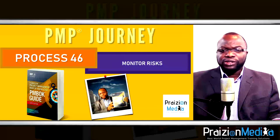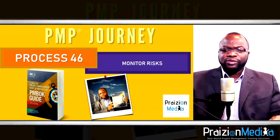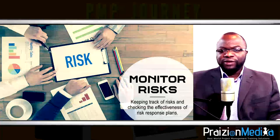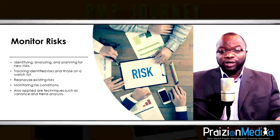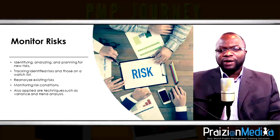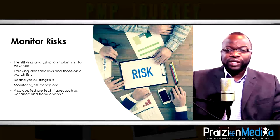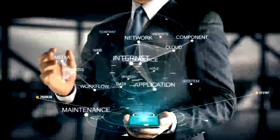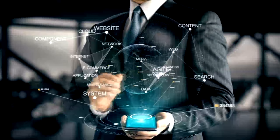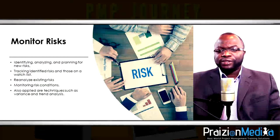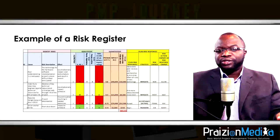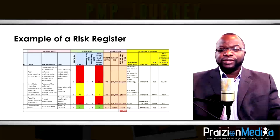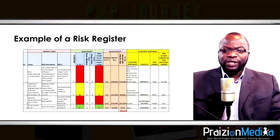Process 46: Monitor risks. The project manager and team are actively checking to make sure that risk responses were relevant and actually worked, that the reserves on the project are adequate, and that anything that could be done better risk-wise is done. Very importantly, the team should make sure that the risks in the risk register are the only risks existing on the project. If the project is exposed to new risks, those must be documented in this process.